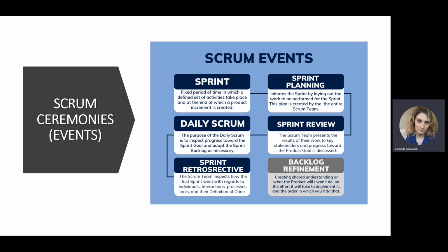At the end of the sprint, there's going to be a sprint review, or the synonym for sprint review is demo. During the sprint review, the Scrum team should show the stakeholders, the product owner, and the customers the progress, the goals that were achieved during the sprint. And the main idea of the demo is to get feedback from the stakeholders on the tasks that were done, on new features, maybe to discuss some blockers, and so on.